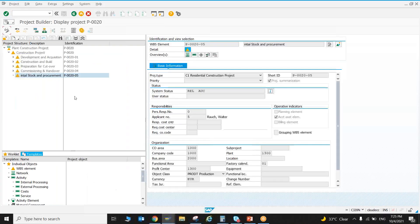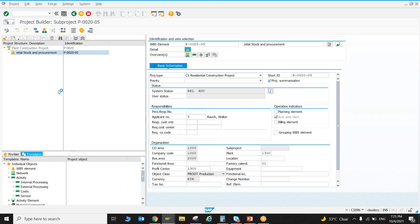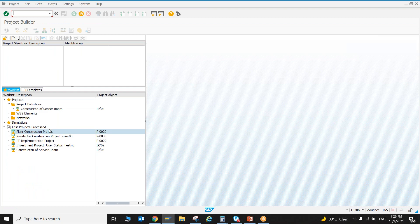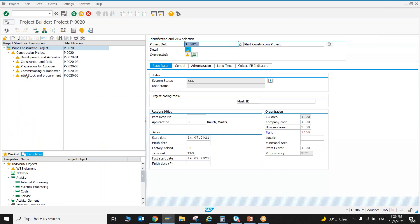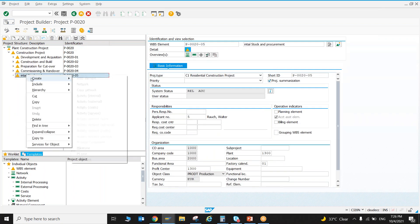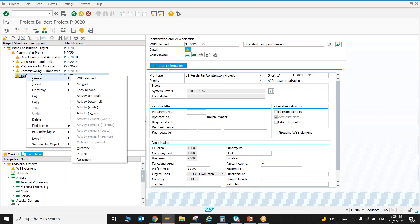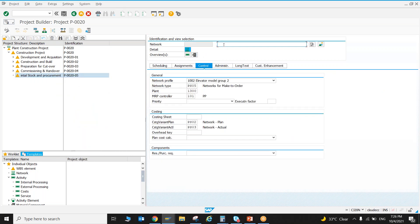Now the project manager or site engineer needs this material on site. I can create a reservation directly here. A reservation is an internal document — it simply states that a particular item is needed on site. It is not a guarantee or a block on the material. If someone else takes that material before you, the storekeeper can issue it to them. A reservation is just a reference number.